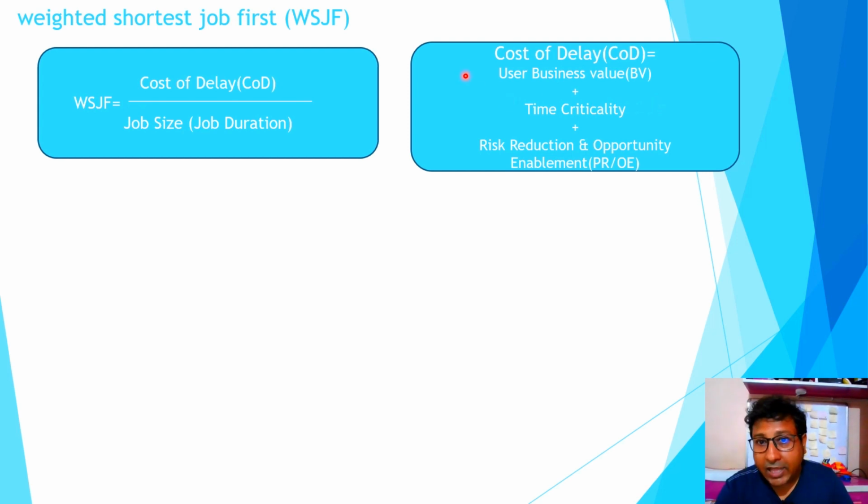So in that prioritization technique, that is basically the relative prioritization technique, only this parameter, business value, is taken into consideration. Business value gets calculated based on different parameters, as I mentioned: the business significance, the criticality of this piece, and if it is not done, what will be the penalty clause, and so on. Depending on the business significance, this business value gets assigned by pure business persons. Okay. Now coming back to this WSJF discussion.